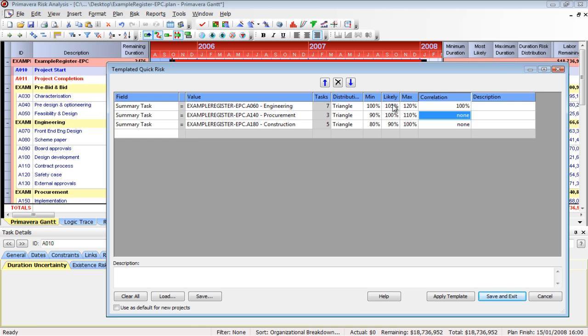One guy could be early, the other guy could be late. One guy could deliver a week early while the other guy's a week late. They aren't correlated. What one guy does is not correlated to the other guy. But if we have welders, they have 100 activities. And if they're late on one, typically their productivity factor is going to extrapolate. Now we're looking at a correlation grouping.